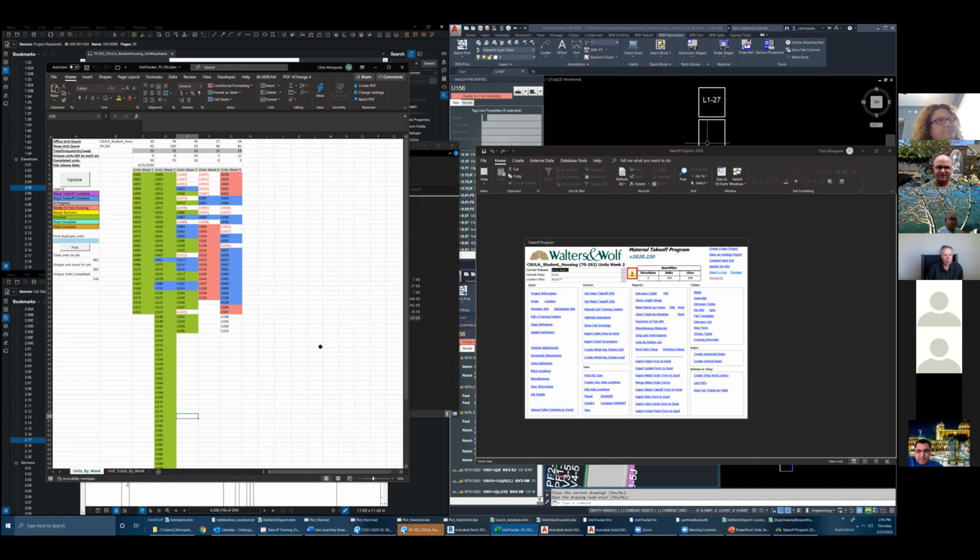Yeah, sometimes when I sit down with the harder ones, we choose the unit for our main operator to do, the transition units, but I categorize them as priority 1 or priority 2. Priority 2 is the easier one, the unique unit, while priority 1 needs a transition or compounded units. Chris would do one unique unit while I'm checking, and once we get another resource or help, that unit has already been back checked and done by that other operator, and Chris will keep on doing the harder ones.